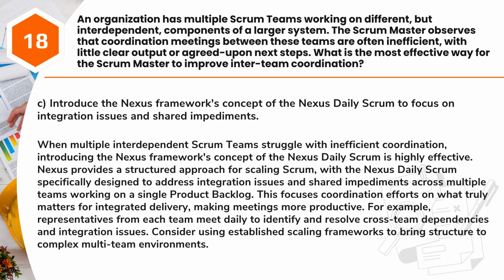This focuses coordination efforts on what truly matters for integrated delivery, making meetings more productive. For example, representatives from each team meet daily to identify and resolve cross-team dependencies and integration issues. Consider using established scaling frameworks to bring structure to complex multi-team environments.